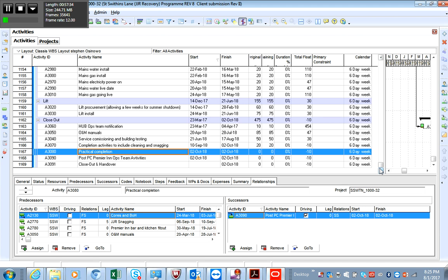You might have site delivery issues in terms of logistics issues. You might have to sequence your deliveries to early daytime before the road becomes high use. There are so many different permutations that will go into your strategy for trying to crawl back time. Does that make sense? Okay.